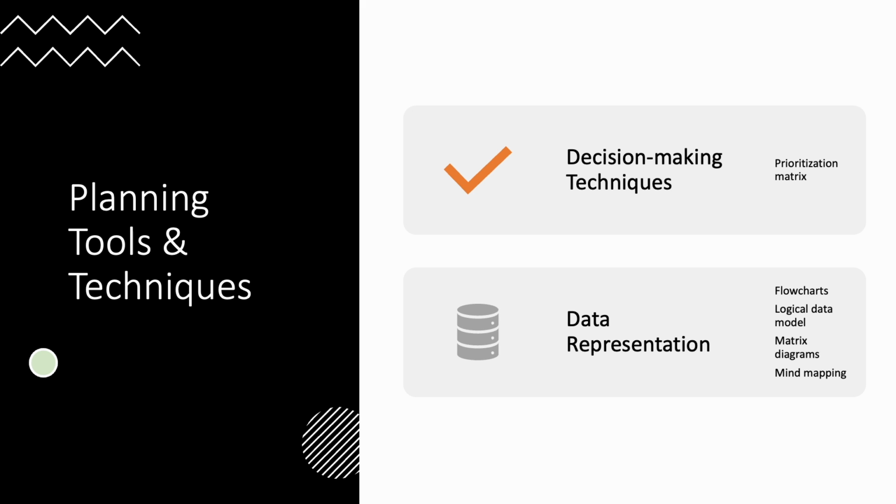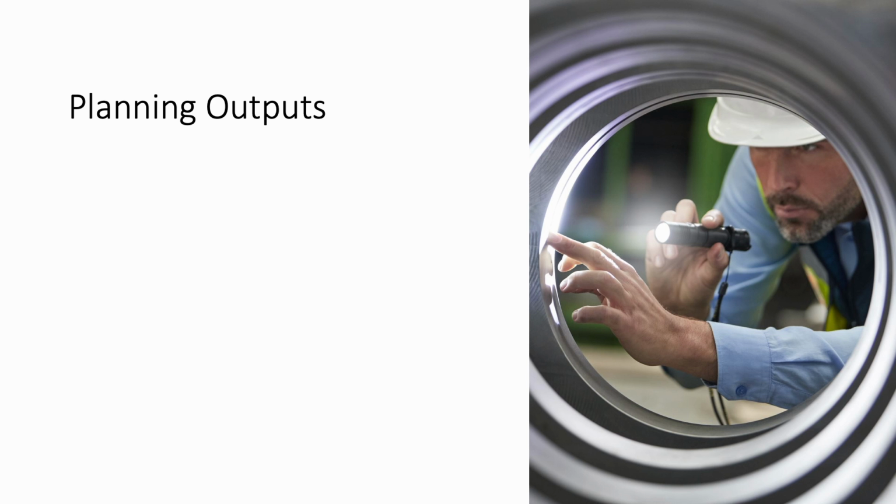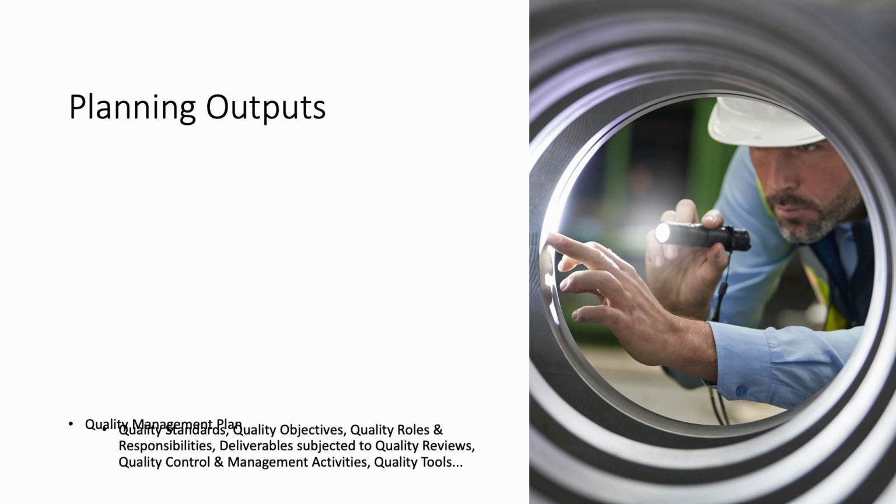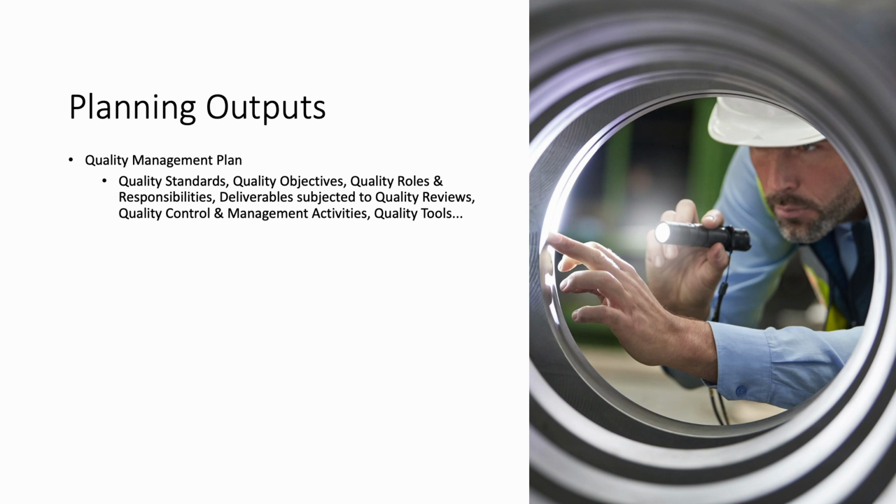Test and inspection planning is the phase when the project manager thinks of ways to test and inspect the product, deliverable, or service. Meetings are held to discuss the development of the quality management plan. The outputs of plan quality management are mainly composed of 4 parts. The first part is the quality management plan, which describes the activities and resources necessary for the project management team to achieve the quality objectives set for the project.